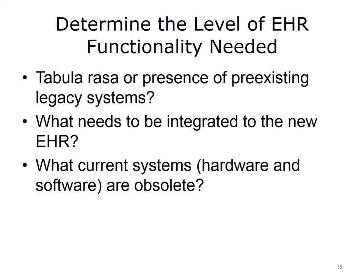When conducting a needs assessment, an organization should determine the desired level of EHR functionality. For instance, the functionality will differ if the implementation is a tabula rasa — a migration from paper to electronic records — compared with migration from a pre-existing EHR to an updated system. The organization should determine what existing elements need to be integrated into the new EHR. For example, if an organization wishes to keep its practice management software, it must ensure the software seamlessly interacts with the EHR. Data stored within legacy clinical information systems should also be transferable to the new system. An inventory of current hardware and software should be conducted early in the implementation process.